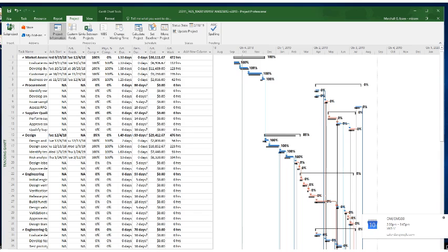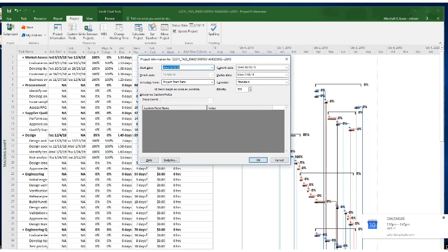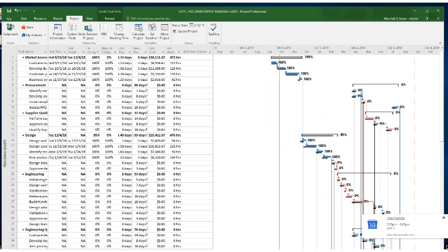You can always change the start date of a project by going to Project Information and clicking on the start date. I would move way away, maybe into a different year, as a different start date, and hit OK. Of course, it just changes everything, and then you go back and change the date to the right start date. That will trick the calendar into scheduling around the holiday that you added after you put the schedule together. So those are the two things that might be